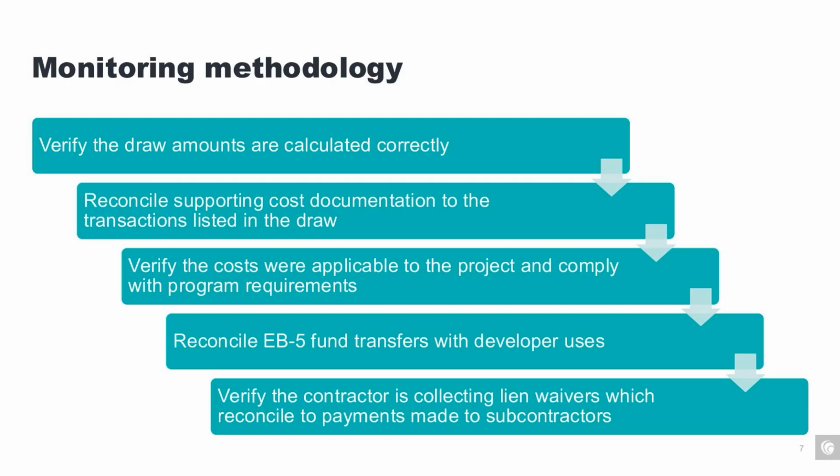What makes the lien waiver management process so important is, number one, if someone is not being paid on a timely basis, why aren't they being paid? Are there quality issues? Are there cash flow issues on the project? Is someone not fulfilling their obligation, either as a prime contractor, a subcontractor, or a supplier? Are there delays in the project? All of these can be contributing factors when a lien waiver is missing.